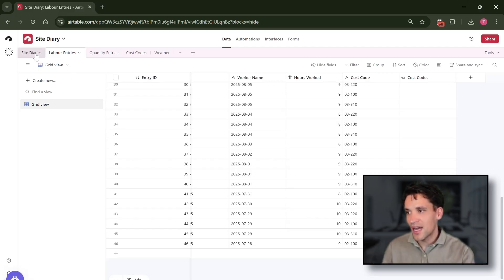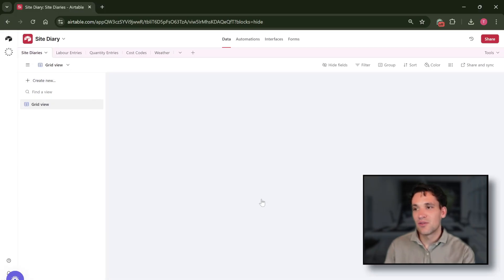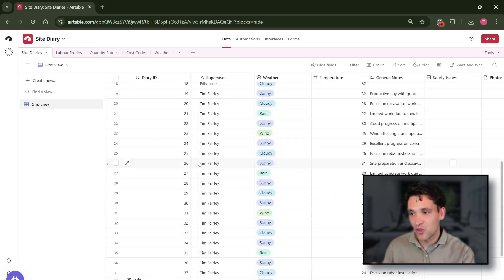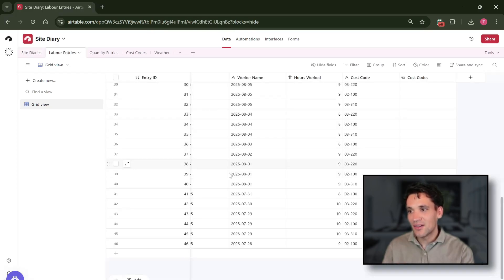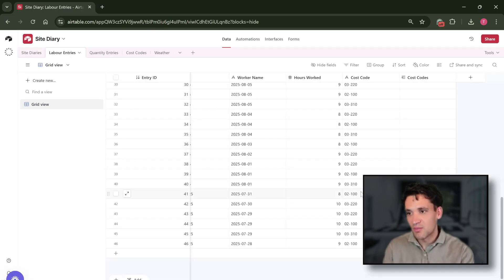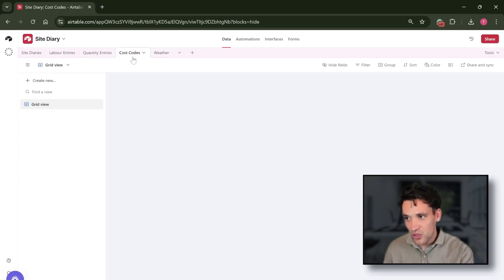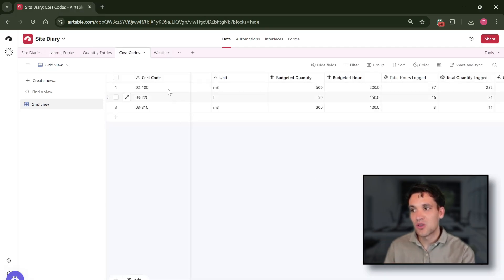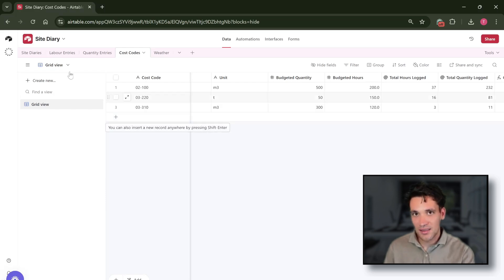The reason we do that is because on our site diary entry we could have multiple workers working against the same cost code on the same day. We need to then break these out into the individual labor and plant entries so we can roll them up on the cost codes tab against the specific cost code, so we can know the total quantity of work completed and the total hours per task.